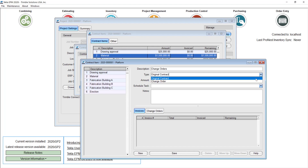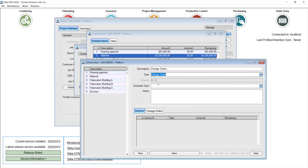In this case the type is not part of the original contract, so I'm going to switch that to change order. You can see how the amount is now grayed out — that's because we just don't know at this point how much money will be required for change orders. I will not link that to anything for now, so I'll save this and my schedule of items is complete.